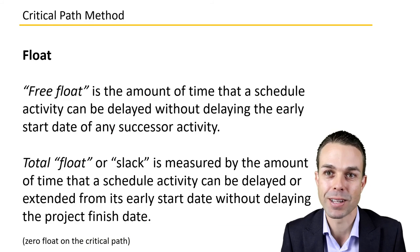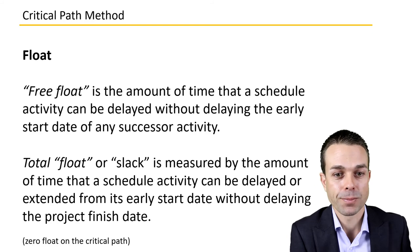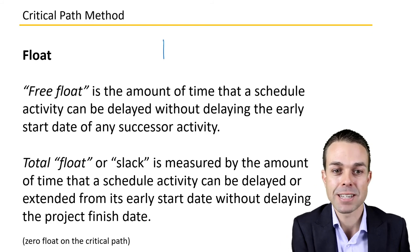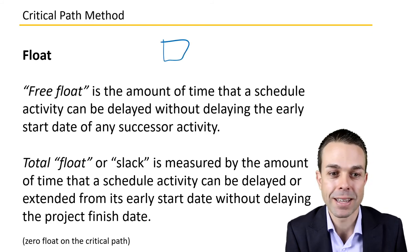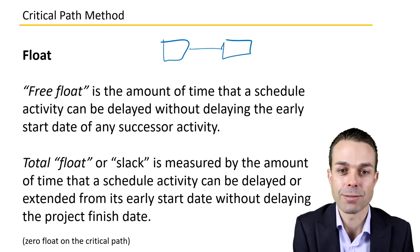That's the idea that we're looking at. So again, broadly or at a high level, free float is the amount of time that a schedule activity, so a single activity, can be delayed without delaying the early start of any of its future activities.